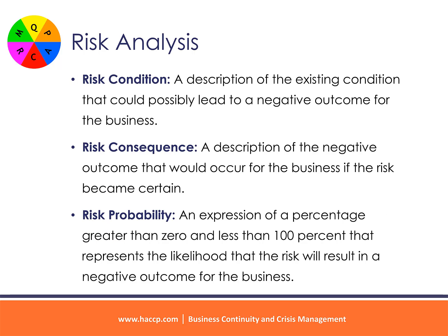Risk condition, a description of the existing condition that could possibly lead to a negative outcome for the business. Risk consequence, a description of the negative outcome that would occur for the business if the risk became certain. Risk probability, an expression of a percentage greater than 0 and less than 100% that represents the likelihood that the risk will result in a negative outcome for the business.